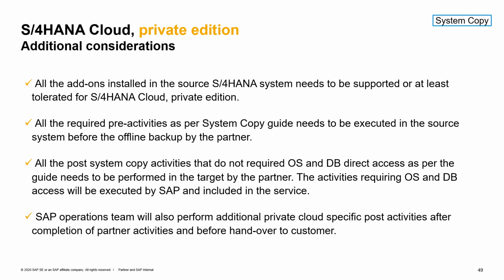All the post-system copy activities that do not require the operating system and database direct access, as per the guide, will need to be performed in the target environment after the switch into the final primary application server. The other activities requiring operating system and database access will be executed by the SAP operations team that are included in the service. The SAP operations team will also perform the additional activities after the completion of all system copy activities, and this will allow the final handover to the customer.